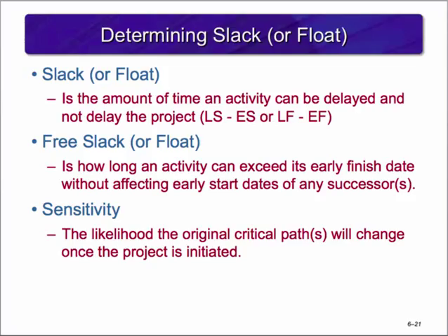Free slack is the amount of time the early finish of an activity can be delayed without affecting the early start of an immediate successor activity or activities. It usually occurs at the end of a chain of activities before a merge activity occurs. Any activity or all activities in the chain can take advantage of the free float.